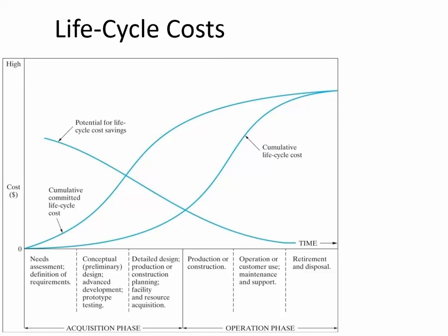And so the interpretation of this is that it's at the beginning of a project that you need to be the most careful about planning, cost estimation, and identifying suppliers who meet specifications at the lowest price, because it's at the beginning of the project, over here on the left side of the curve, when you haven't yet spent or even committed the most money.